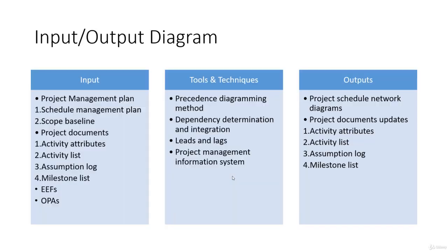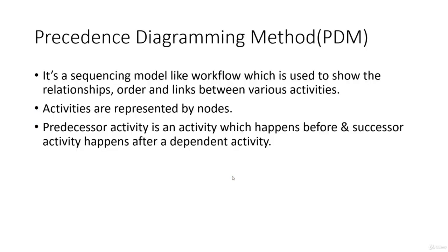So let's go back to lead and lag. I was talking about the time when something is happening before something else. Predecessors are those activities which are happening before a dependent activity. If database setup is happening before the registration page setup, then database setup is the predecessor, and the login page setup will happen after the registration page.